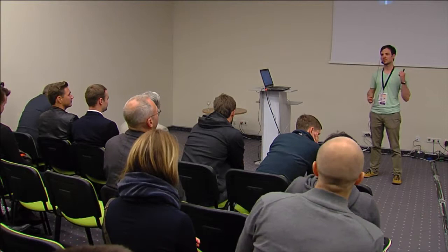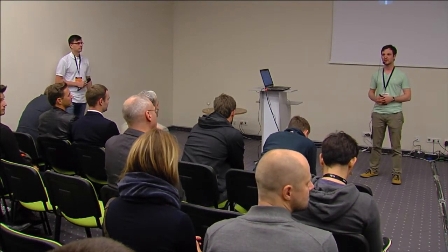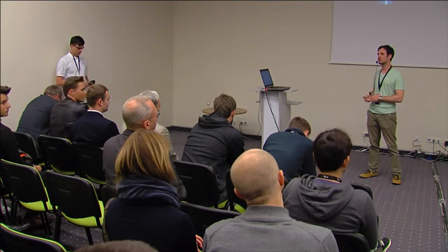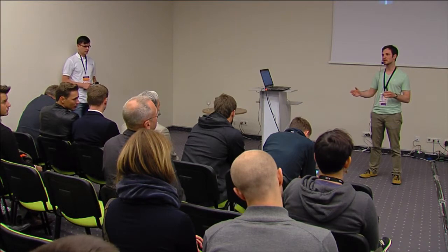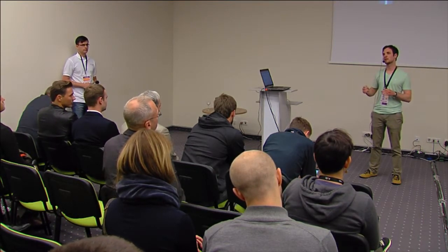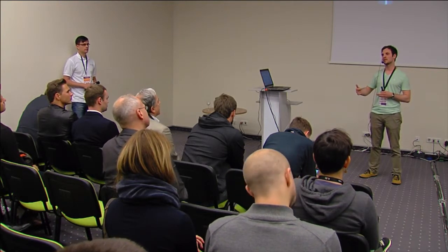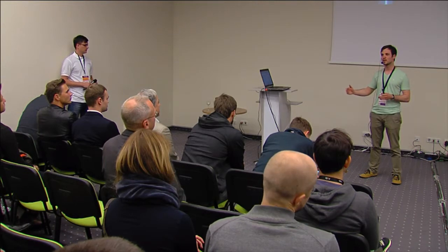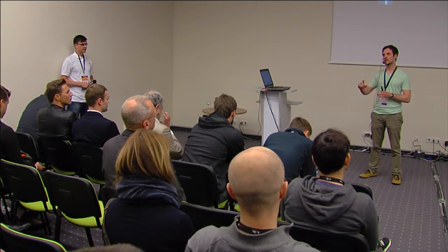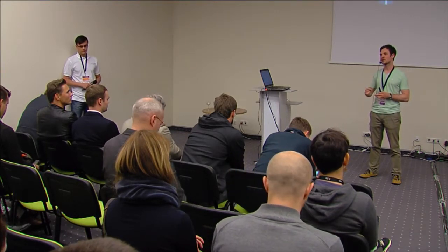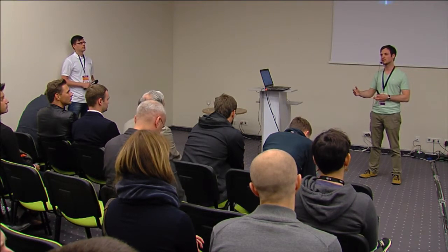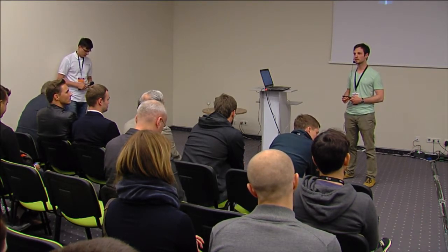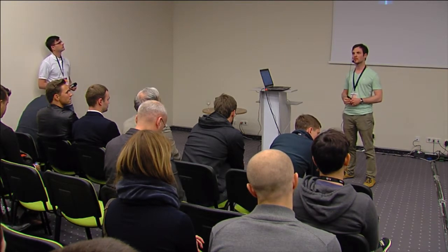I can give you a general answer because that was not the case with this team. As I said, the statistics were not reliable. But the general answer is that if you measure lead time, and work in progress, and throughput, which is how much stuff we do in, say, 2 weeks, then you can take, for instance, that we complete a story in 10 days. Now we have a span of 3 months. How much can we do in 3 months? You take your average WIP, work in progress, and this average lead time, and divide using Little's law, and there you get it. There is an article about that by David Anderson on the internet, which describes in detail how you can do this.